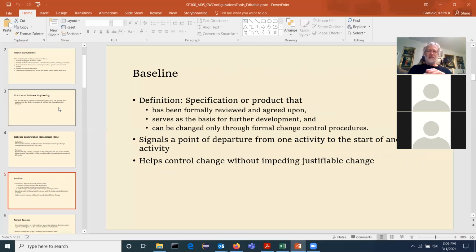Okay, what's the baseline? That's the thing that everybody agrees is the starting point. You take a snapshot of the software and you say, okay, that's the baseline. Okay, can that move over time? Yeah, after certain development cycles, you might say, okay, now we have a new baseline. But everybody has to agree to that. The customer, the developers, the management, people driving requirements, right? The test team, everybody has to agree to that.